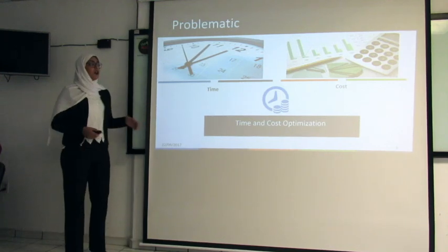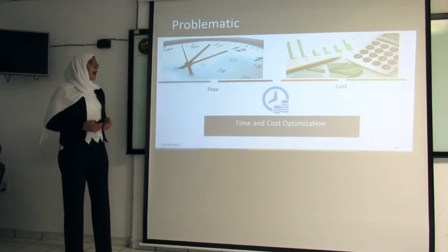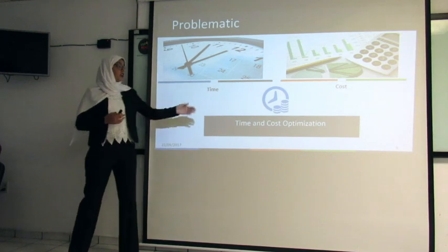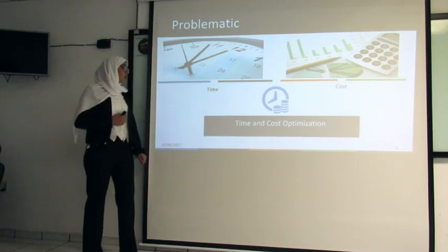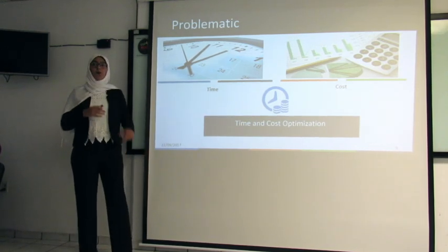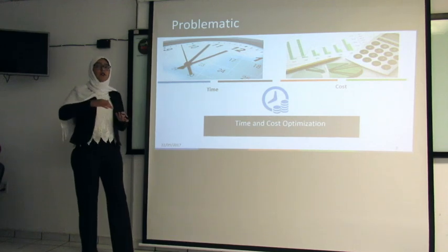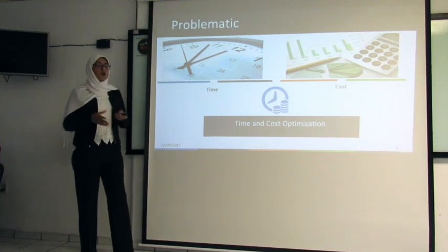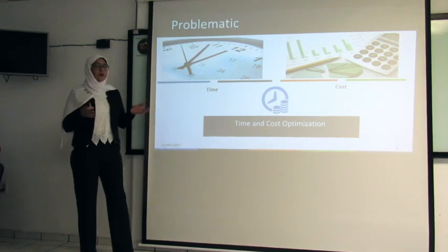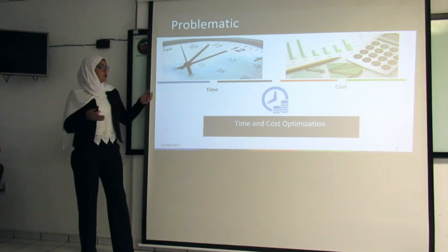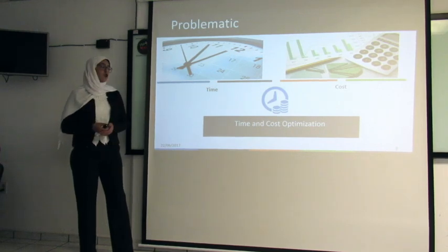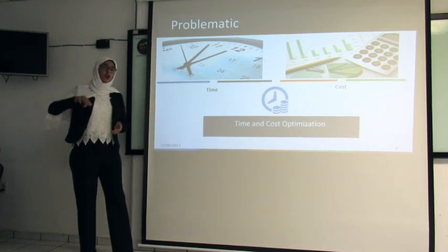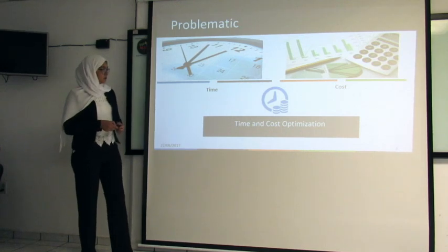So that's why we've been thinking about optimization, time and cost optimization. To do this, we'll be working on the critical activities and minimizing their duration in order to find the optimum project duration corresponding to the minimum total cost.